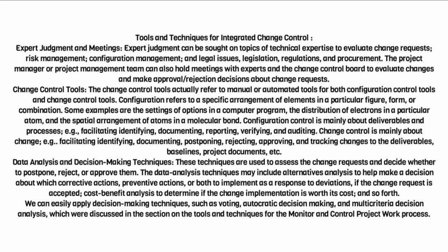These techniques are used to assess the change requests and decide whether to postpone, reject, or approve them. The data analysis techniques may include alternatives analysis to help make a decision about which corrective actions, preventive actions, or both to implement as a response to deviations, if the change request is accepted, cost-benefit analysis to determine if the change implementation is worth its cost, and so forth. We can easily apply decision-making techniques, such as voting, autocratic decision-making, and multi-criteria decision analysis, which were discussed in the section on the tools and techniques for the monitor and control project work process.